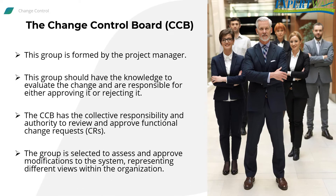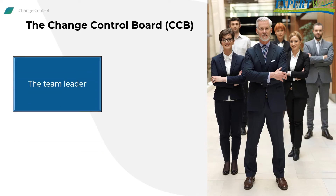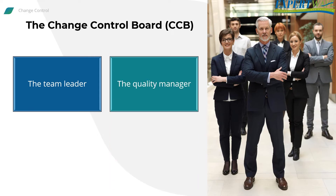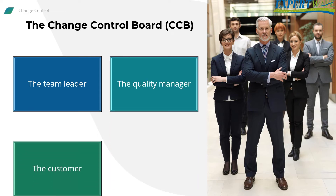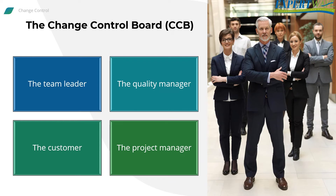The group is selected to assess and approve modifications to the system, representing different views within the organization. As a project manager, my CCB would consist of the team leader, who understands the technical aspects of the software; the quality manager, who understands quality aspects; the customer, who understands the business domain; and myself as project manager, who understands cost and schedule. That's at least four members who need to meet to discuss the change request together.